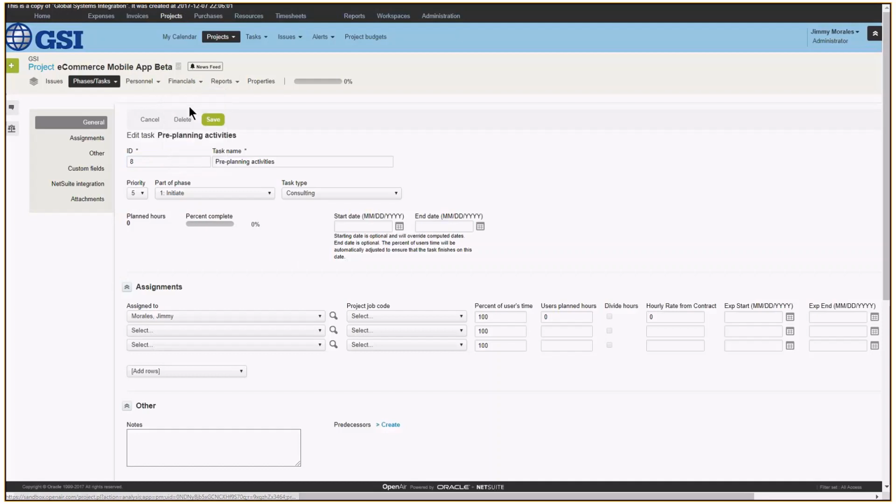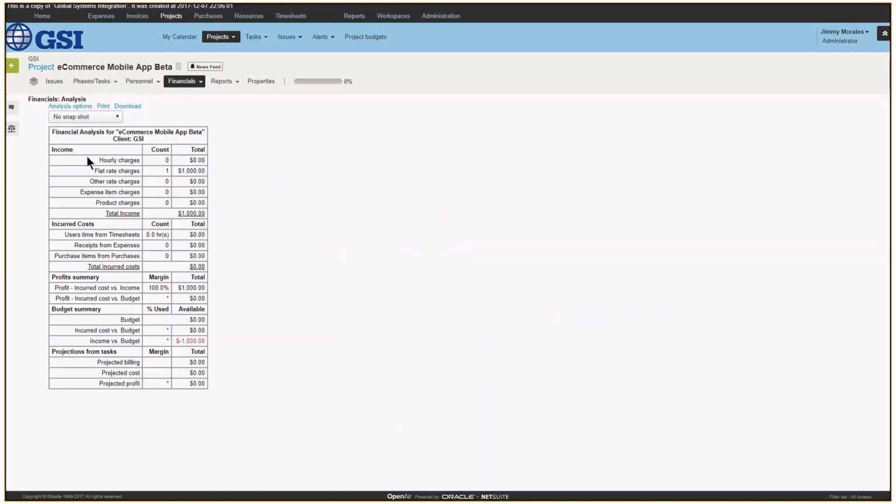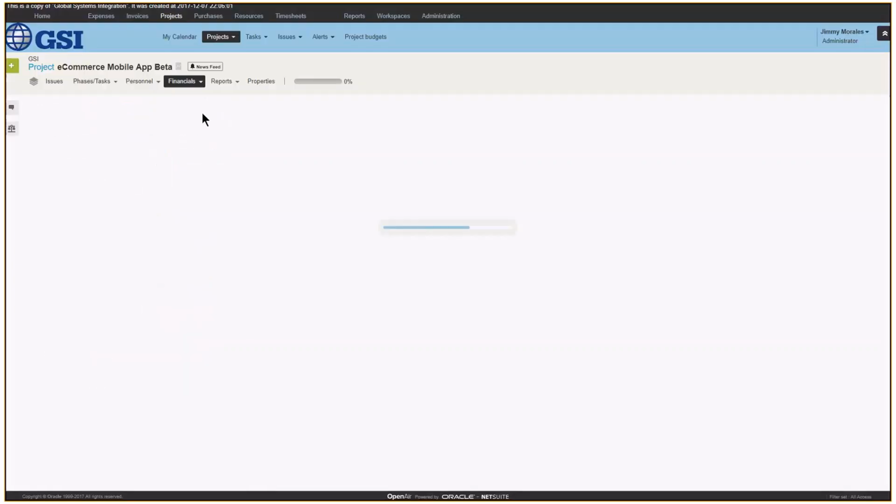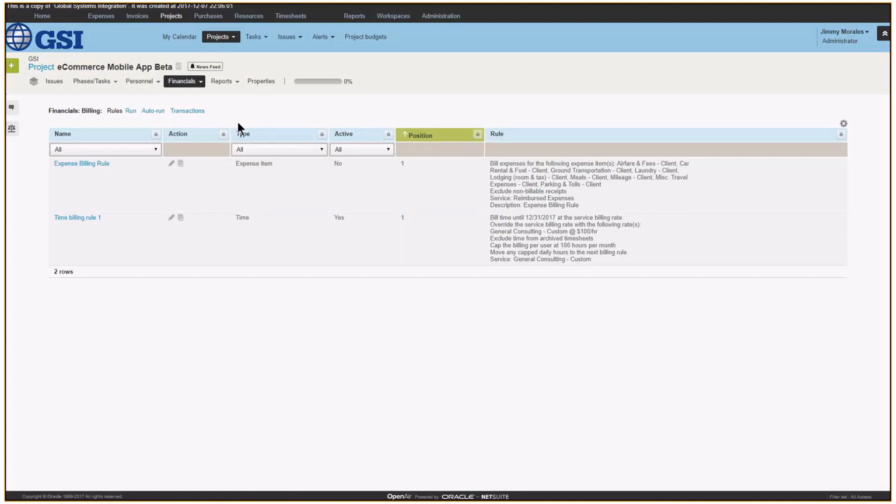Financials house information like the analysis of the project, which gives you a quick snapshot of how the project is progressing financially, recognition rules, project budgets, or billing rules. We're going to look at billing rules, which can contain rules that convert time that's submitted against that particular task and convert them into charges so that they may be invoiced. In this example, we have two billing rules, time and expense. You can include other billing rules, such as milestone bills or fixed flat fee billing. You can set them to recur or